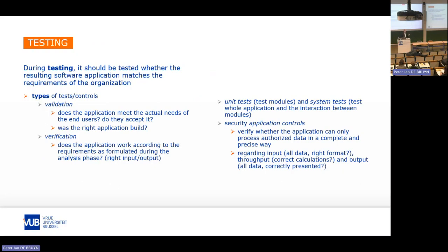One of the reasons, again, why projects fail is also because there might be intermediate versions. There might be prototypes before the final product is there. Then there are normally testing sessions, and some of the testing will be technical, but some of the testing needs to happen with end users. It's important that those prospective end users are very much involved, that they show up, that they dedicate time and resources to testing, and that they give honest feedback. If something is not working, if something is not according to your needs, that is the time to mention it, because then maybe something can still be done.